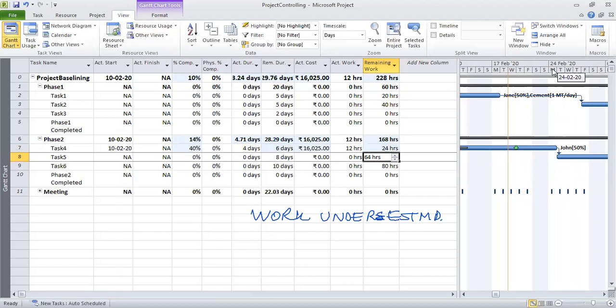So one thing which I can do is I can see if the person assigned, who is John, can take up extra hours of work. Can he do overtime? And the answer could be yes. John is okay with overtime. So what we can do now is I can ask John, and also note the cost here. Let us add one more column, which is cost.